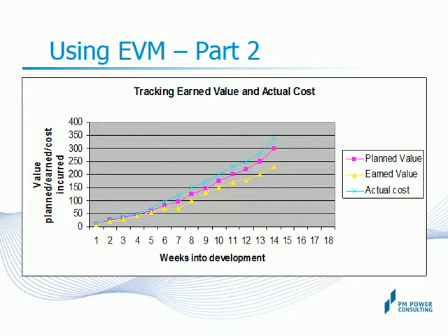Of course, you may ask, what is the point in doing the EVM analysis at week 14 when it is probably a bit too late for any corrective action? You are right in asking that. The EVM analysis should have been done in week 6 or week 7 of the project. That would have brought out the reasons for underperformance much earlier, providing a broader choice of corrective actions and time to recover.